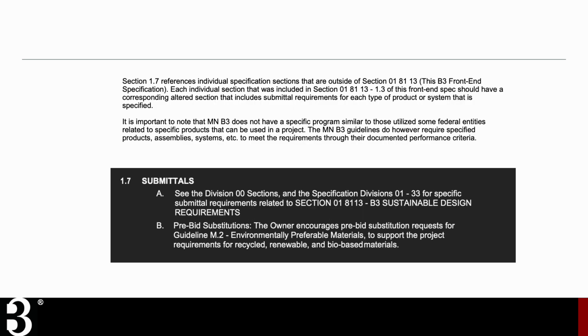Section 1.7 deals with submittals and how substitutions should be dealt with in the project process. Submittals are a vital way of back-checking the process and setup of the construction documents, the drawing set part of that, and how they relate to the spec manual.